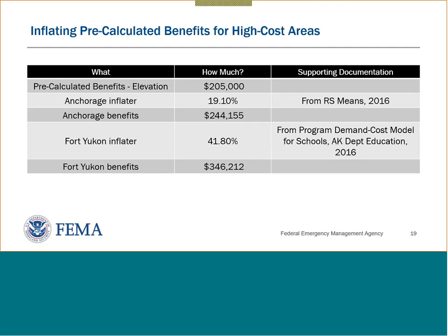They publish cost documentation at least once a year. So you can use that to figure out if you're in a high cost area, and what that higher cost might be. So for this particular project, which is in Fort Yukon, which is up right about the Arctic Circle north of Fairbanks, there's two steps at least for Fort Yukon. And the first thing is to understand what the inflation factor is for the city or the municipality of Anchorage.